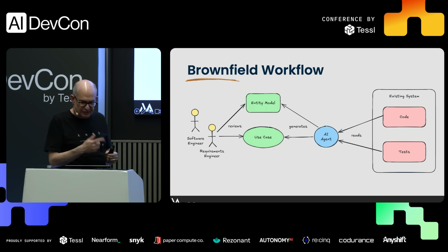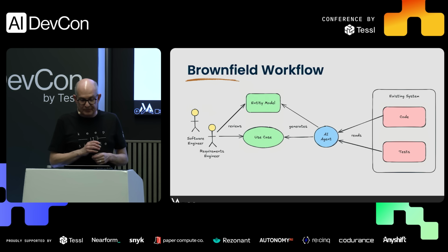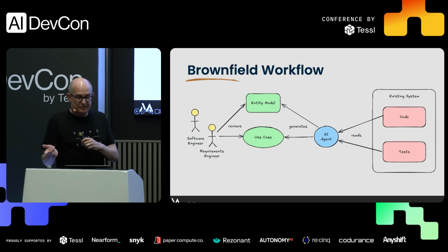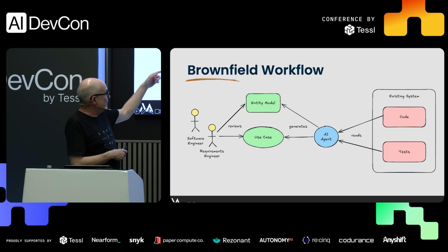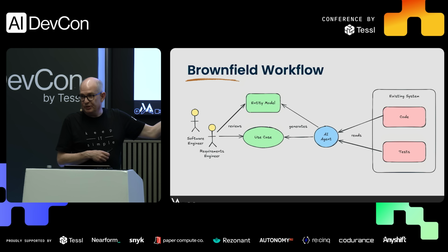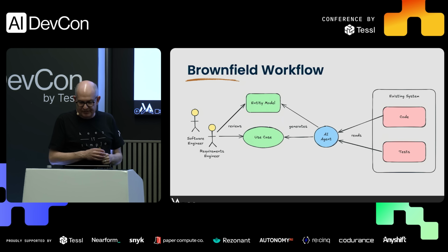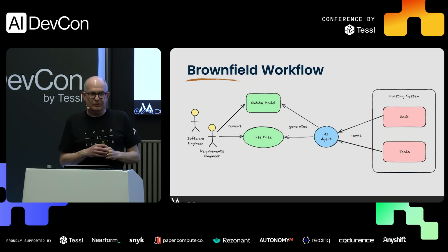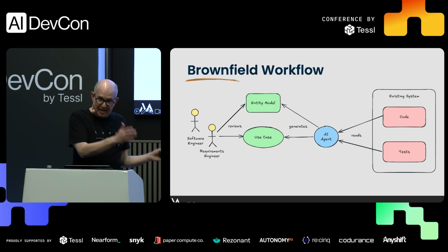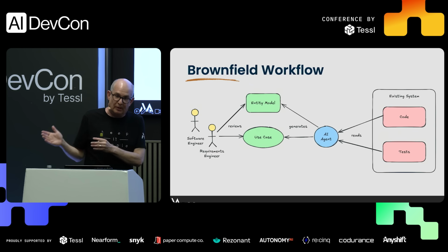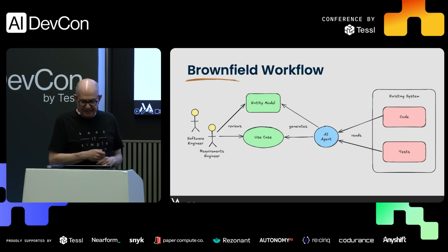And because of this reverse engineering, we also have positive feedback from the end users, because we are not transforming from one technology to another. We're going over use cases and the entity model, and we can integrate new features. Because usually you don't do that. The guideline when we started with the modernization project 2 years ago was we want to have the exact same system, just in another technology, and you don't add new features because we don't want to introduce new bugs. And now we can just do that, because we just change the specification.